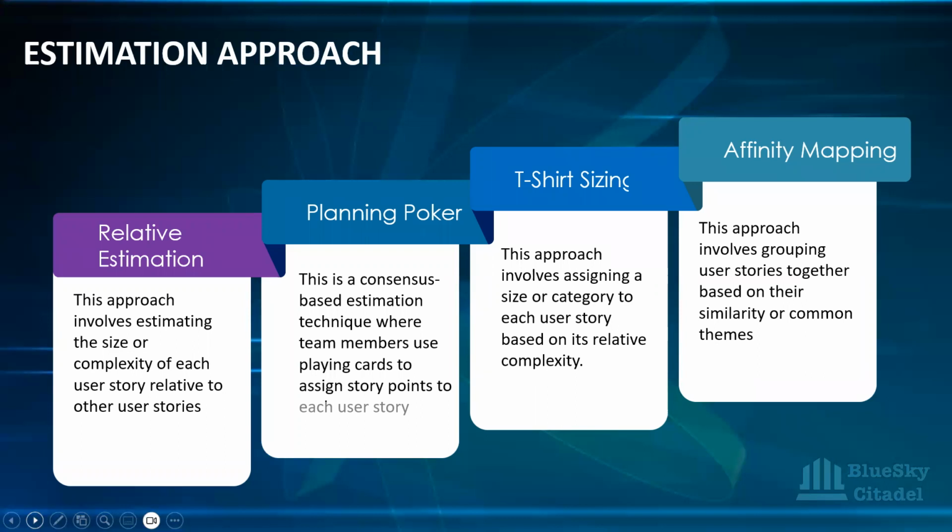Okay, so you're able to compare two stories together in order to estimate. The estimate you give a register story definitely won't be the same estimate you give a login story, because you're able to compare them together. That is what you do with your relative estimation. So, like I said, a higher story gets more story points because it's more complex than a lower story, which is not more complex. The best example I can use is just register and login.